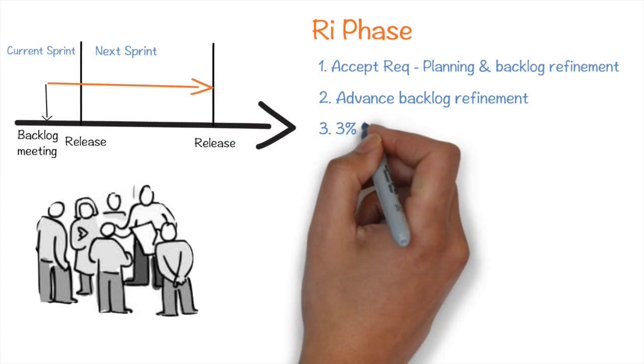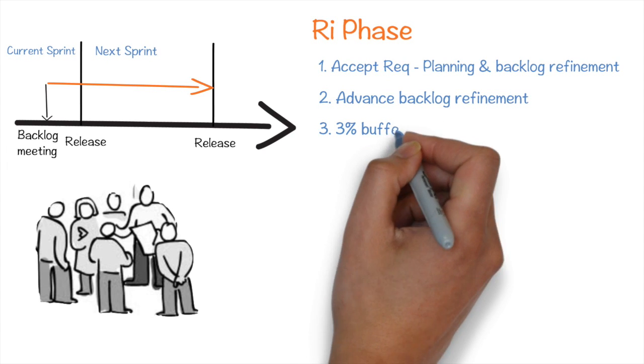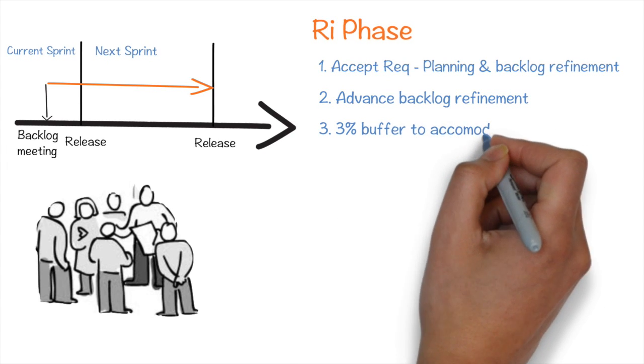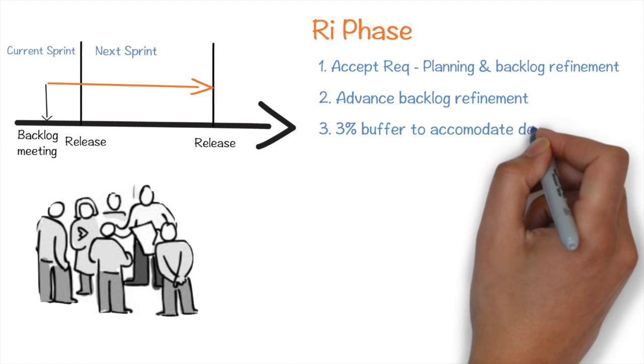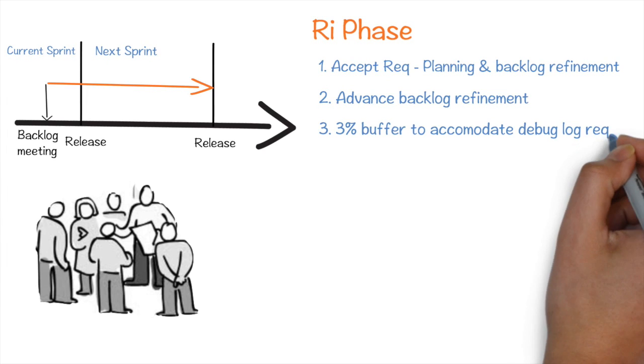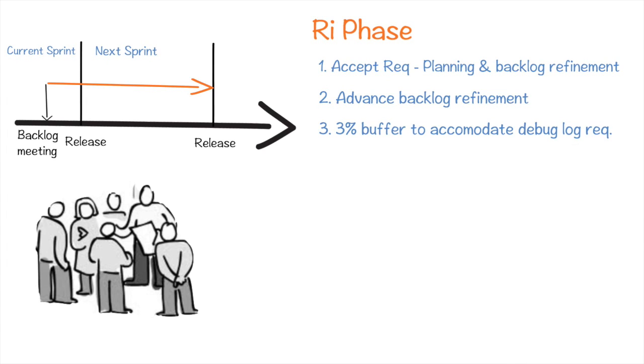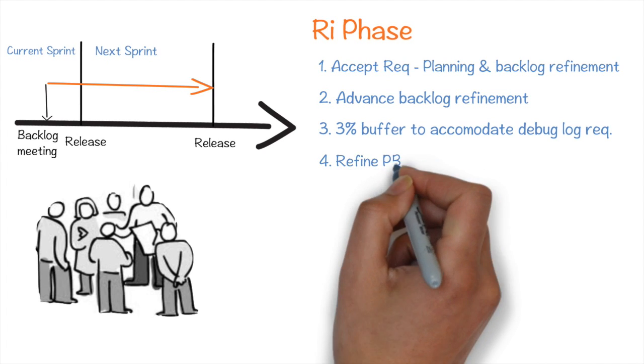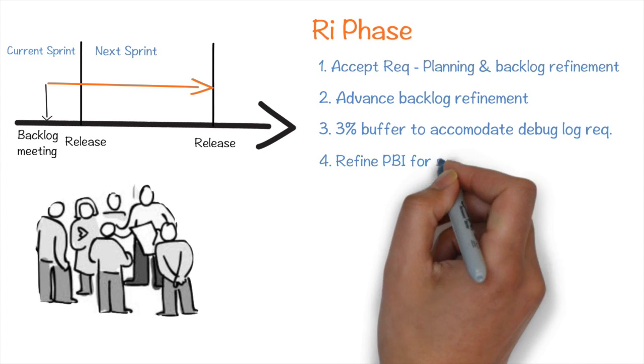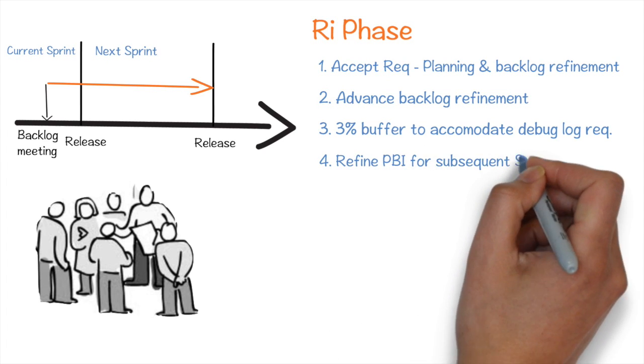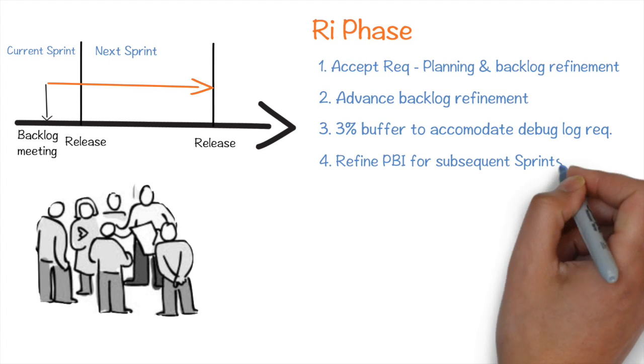Three, in their current sprint, they would allocate 3% of buffer to accommodate debug log requirements which comes during refinement meeting. And finally, four, continue with their existing practice of refining PBIs for their subsequent sprints.